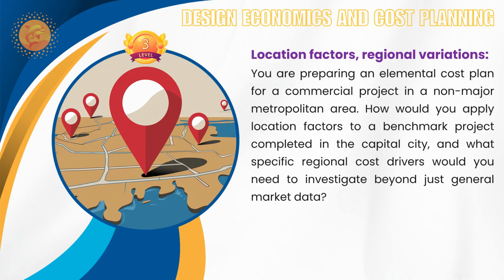Then you have to take into consideration the shifting of labor, plant, and all these logistical cost differences first. That is the starting point. Then you have to consider the local factors by investigating how they will impact your different construction methods, availability, and particular specialist subcontractor cost in that region.